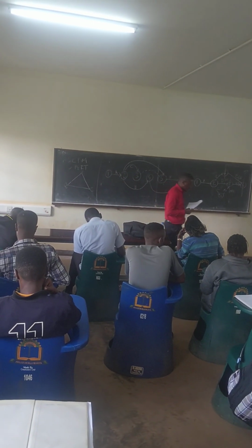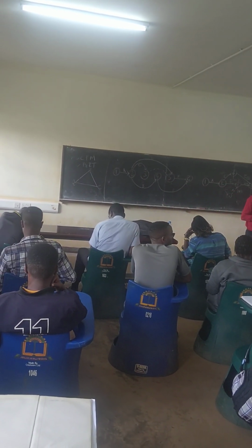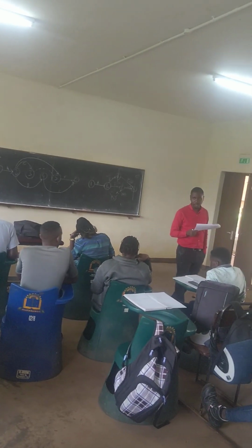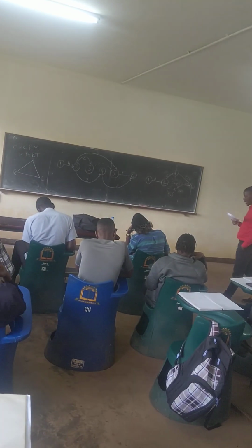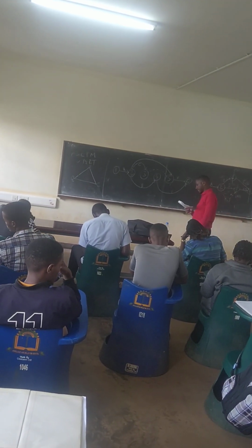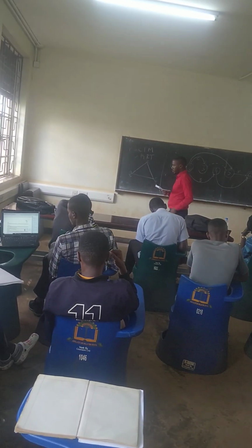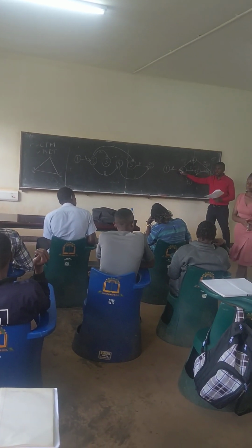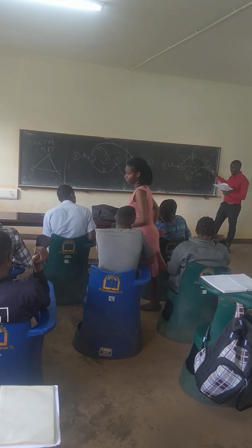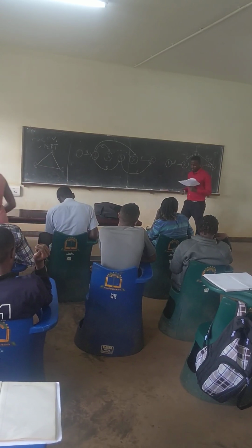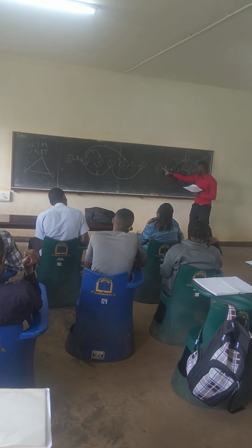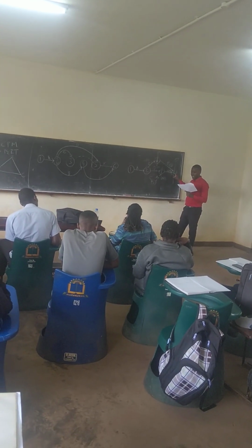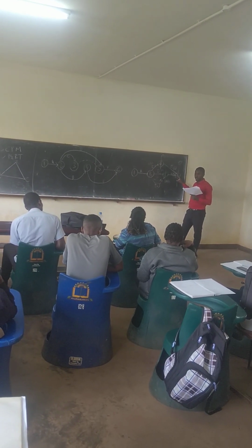Okay? They define what total float is, and they even give us a formula for how total float is computed. They tell us that total float is the amount of time a path of activities could be delayed. We've had so many paths, haven't we? Now they're telling us that, let's say we are looking at this path, this path could be delayed without affecting the overall project duration.